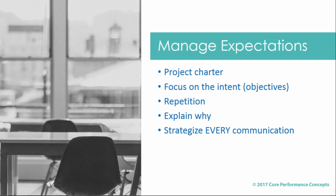none of the things that they listed as the outcome are really measurable. I said, that's a problem. Because if you're talking about initiatives for an organization, how do you know when you've achieved it? So take that from an organizational level and also at your project level. You want to know when you've achieved it. And if you can't clearly articulate that and make it measurable, then you're potentially at risk for having scope creep.